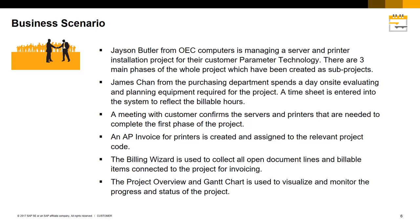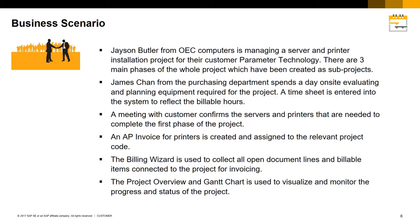An AP invoice for printers is created and assigned to the relevant project code. The Billing Wizard is then used to collect all open document lines and billable items connected to the project for invoicing. The Project Overview and Gantt chart is then used to visualize and monitor the progress and status of the project.